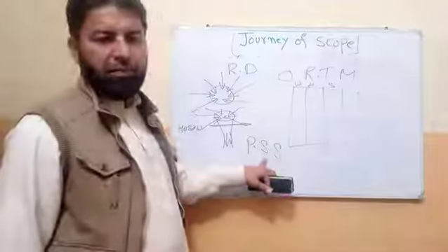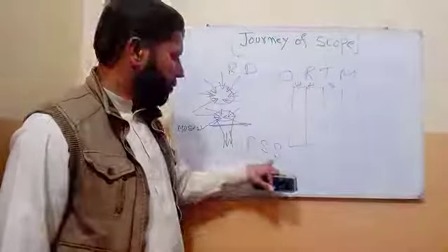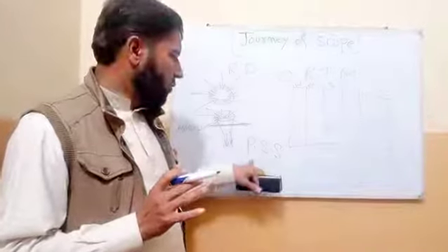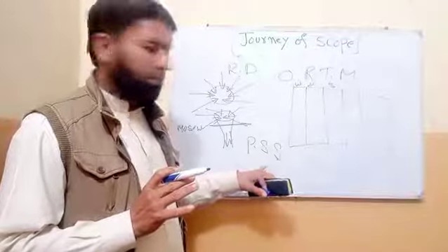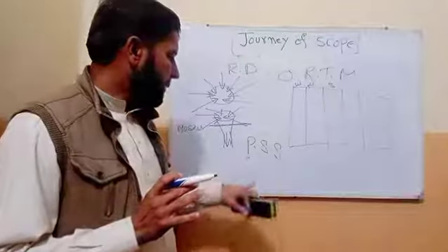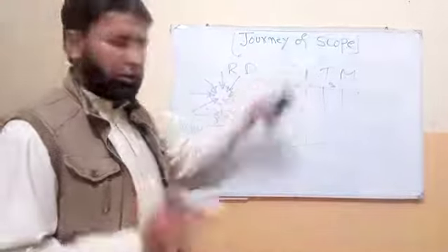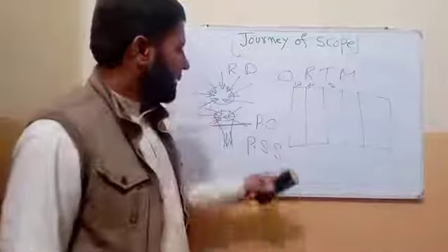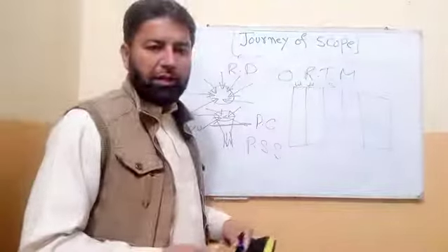This is a very important document. Inside our project scope statement, assumptions, constraints, what we are going to do, what we are not going to do, all the things are mentioned in the project scope statement. And there is a big difference between the project charter and the project scope statement. In the project charter, there is only one line given.